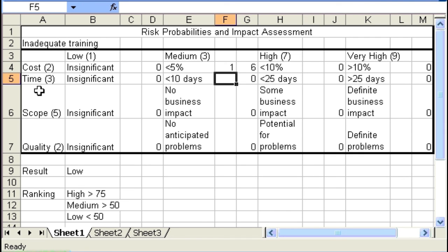Then we look at time. What impact is inadequate training going to have on total project timelines? Insignificant? Absolutely not. Less than 10 days? Less than 25 days? Greater than 25 days? In this case, the impact is going to be greater than 25 days. We have the additional 5 days training times the number of team members we have on our team, plus the time lost when they went back to their desk before we realized that we had to bring in additional training. So we put a 1 into that grid.